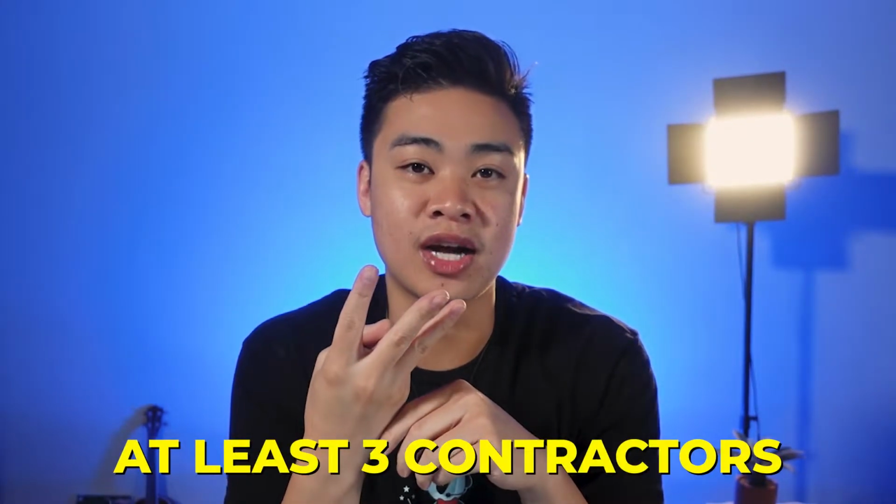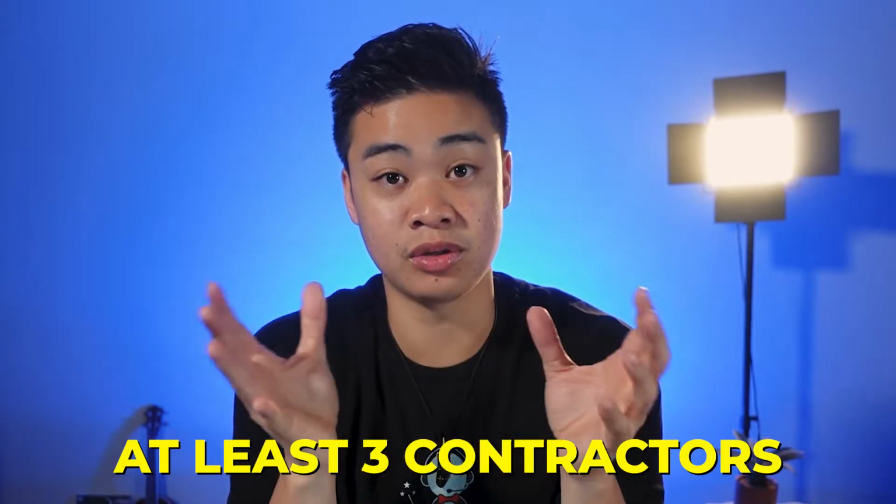And that's a bid. They're essentially giving you how much it's gonna cost. They're gonna quote you for all the different details of the rehab. So ideally, I'm bringing out at least 3 contractors to get bids for every single project. And the reason why I bring 3 is if I bring one contractor out there to get a bid, and they know that they're the only contractor I'm bringing out to the property, it's likely that they might charge a little bit higher on all their prices.